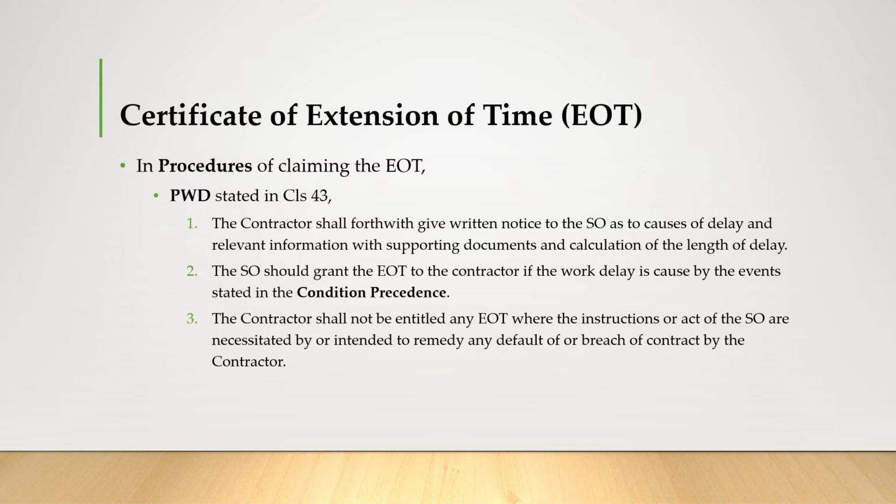Secondly, the SO should grant the EOT to the contractor if the work delay is caused by the other events stated in the condition precedents later. Lastly, the contractor shall not be entitled to any EOT where the instruction or act of the SO is necessitated by or intended to remedy any default or breach of contract by the contractor.